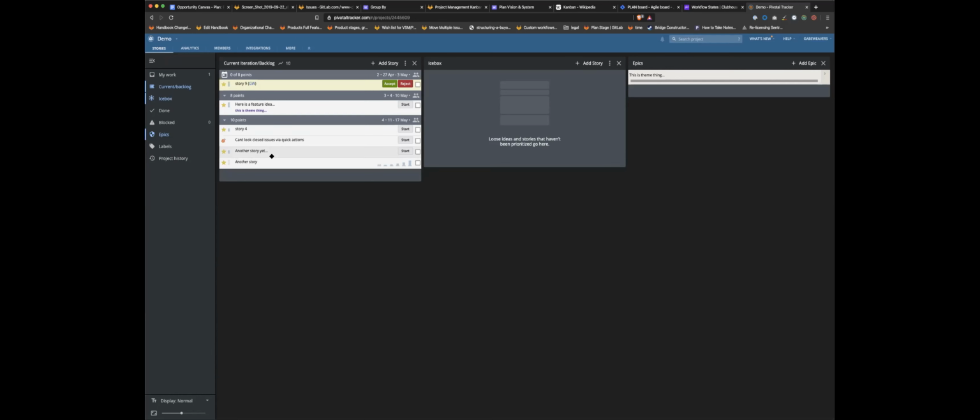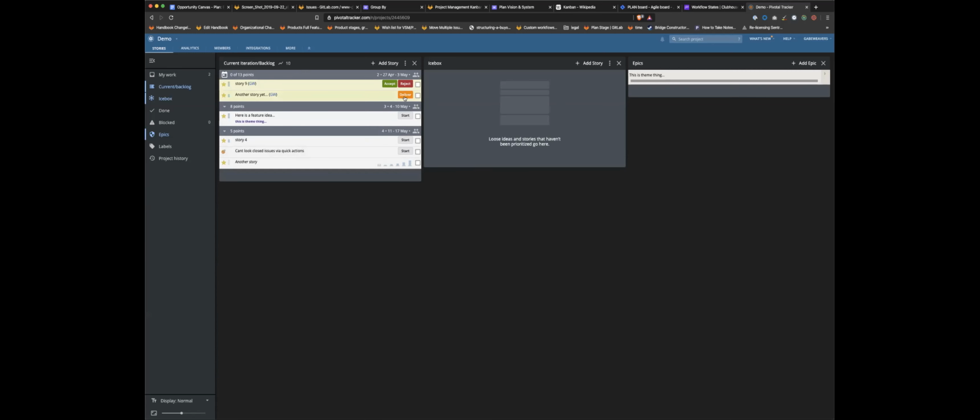So what is it about this board that solves your pain points so much better than our board, for example? It's all in one thing, and it's all prioritized. I don't have to have cross sections of workflow states, right? So in Pivotal Tracker, you can't define what steps a story goes through. It basically is defined for you. You start it, you finish it, you deliver it, and then you accept or reject it, and that's it. So I don't need those vertical swim lanes.